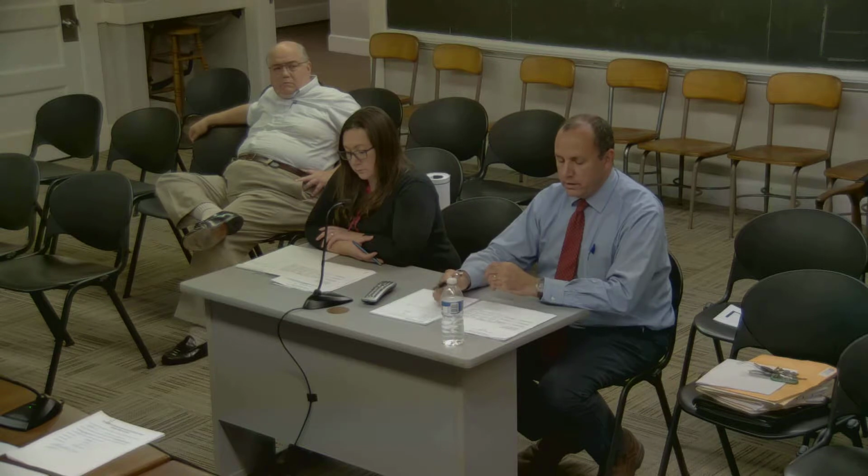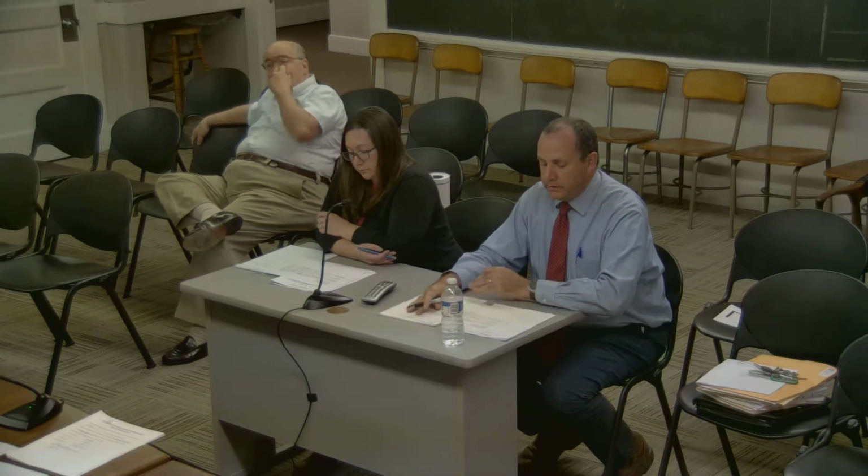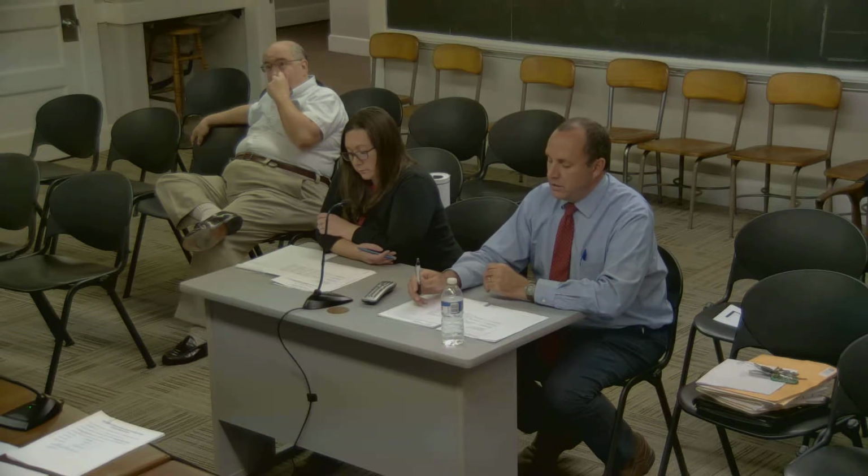So, being that we are under budget, if you were to take these alternates, you would have to take them in order. So what I've passed out has the bid amount with each alternate, and then each below alternate is the running total. So if you took all three of those alternates, Fontaine Brothers actually comes out to be the low bidder at $32,552,000. And Hutter Construction comes in at $32,567,000. So they're still very close, even on the crazy alternates. On a $32 million project, it's dollar for dollar, that's crazy. Yeah, it really is.